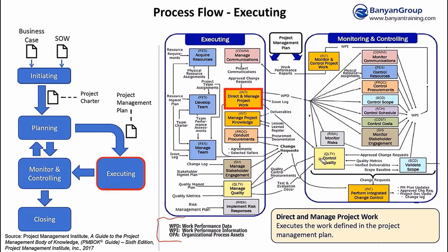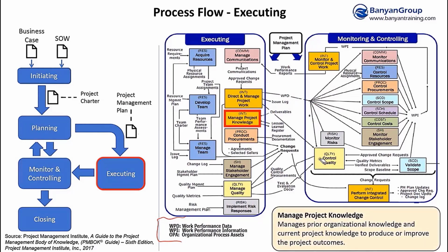All right, continuing, as you see, this next process is manage project knowledge. So there used to be this kind of idea that you'd have lessons learned at the end of the project, and you would collect that, and it would help you on future projects. Well, PMI is definitely emphasizing now that lessons learned is not just something you do at the end of the project, it's something you manage throughout the project to help you on the current project and on future projects.